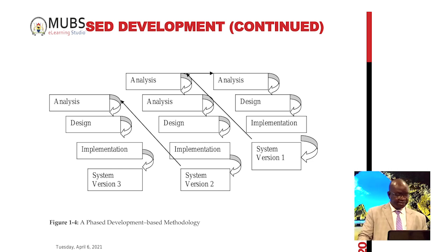And then categorize the requirements into a series of versions. The most important and fundamental requirements are bundled into the first version of the system. What the organization needs most from the system is given priority for development. The analysis phase then leads into design and implementation, but only with the set of requirements identified for version 1.